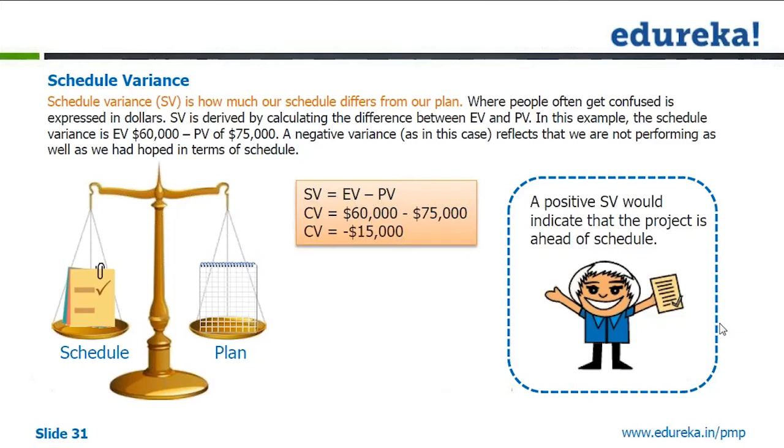The freshers' cost is less. So you are doing well with budget, because you asked for 4 experienced resources. Experienced resource cost is higher, whereas you have got freshers where cost is lower. So you are doing well with your cost, but because of their productivity, you are not able to achieve the target of completing the work.